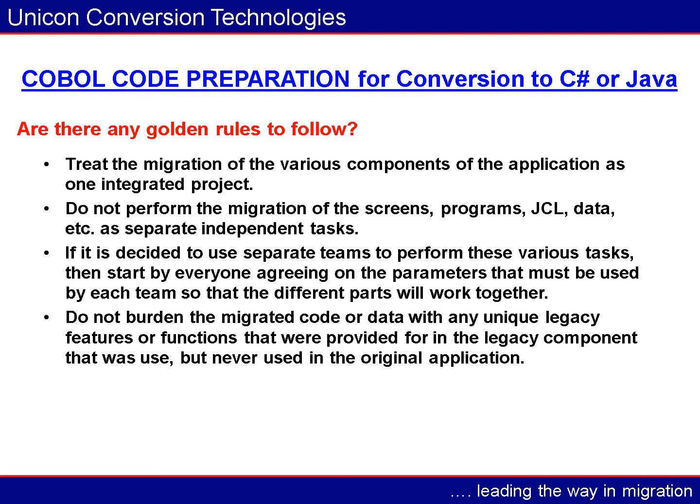However, it was very slow in operation. We found the converted database feature that was causing the poor performance, and then found that the feature was never used by the original programs. When the feature was removed from the converted SQL Server database, the converted application ran extremely well, far faster than the original. If this determination had been done before the start of the project, then the project would not have been over budget and time frame.